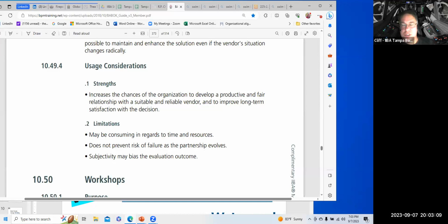But if I was on the customer side and I was dealing with a vendor, I'd want some of that vendor's developers, or at least heads of certain departments that deal with certain things, on some of those calls. So that when the salesperson says, I want to integrate this application with this application, I want the data here and I want it there, and they ask for it real time, thinking, oh, I enter something here, it's going to show up over there, and vice versa, which is a huge no-no. If you only have salespeople on the call, they will promise the moon, and then it gets to people like me who have to implement it and say no.